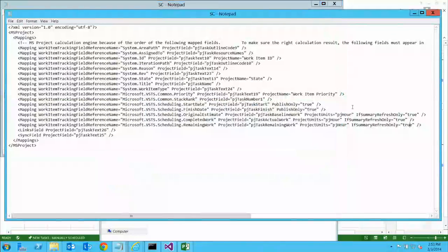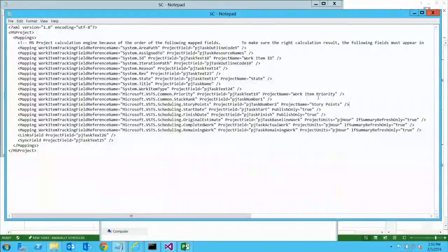So what Chaitan's saying is that the default instance of Project Server doesn't have story points natively in the field. So he's basically putting in another line that says, by the way, I'm just copying this, here's the field variation name so I can add story points in. So I mentioned that this is the pointer where the TFS is sitting, and this is the project field where it's going to drop the file.